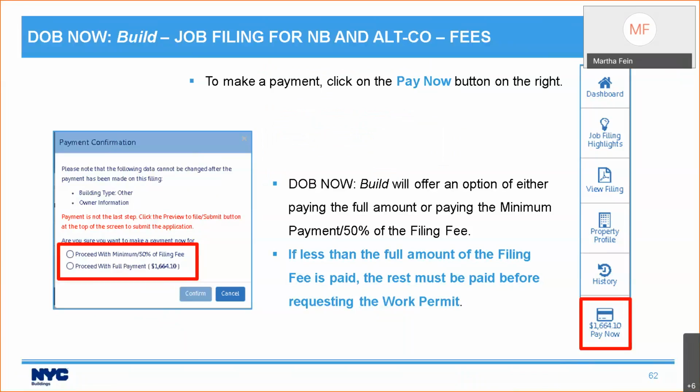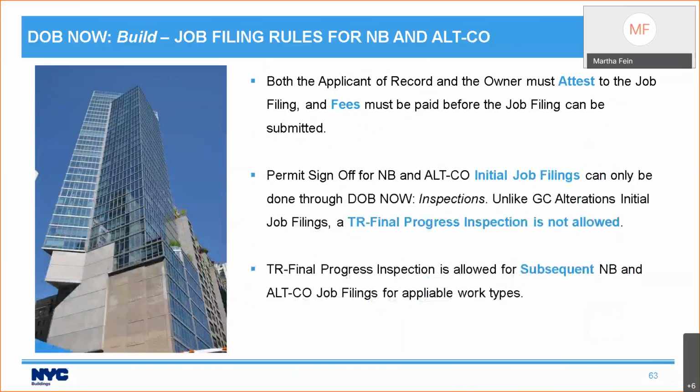If you choose to pay less than the full fee, then you need to pay the rest of your fee before you can request your work permit. The actual paying the fee is the same as it's always been through the city pay system.